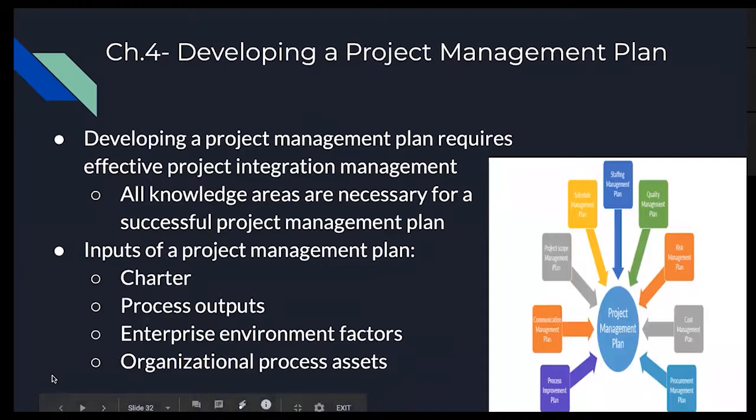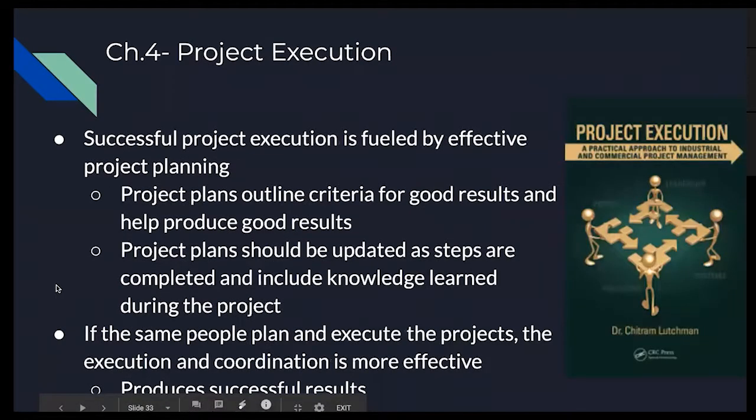Now with the project management plan, we see that developing a project management plan requires effective project integration management, meaning that all knowledge areas are necessary for a successful plan. And some of the inputs for these plans are charters, as I just described, process outputs, enterprise environment factors, and organizational process assets. Moving on to the project execution.